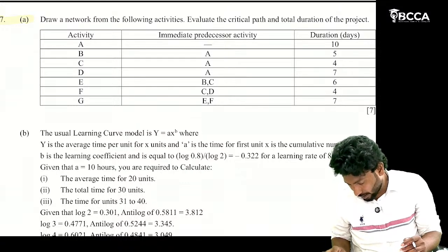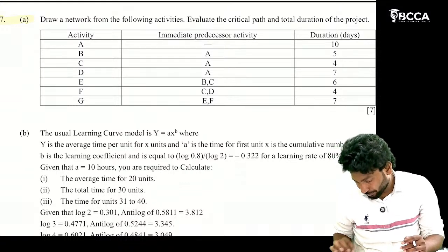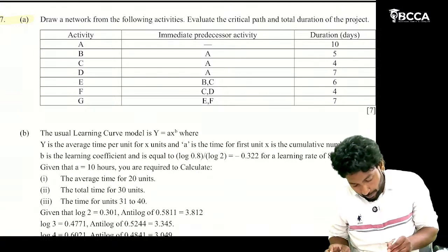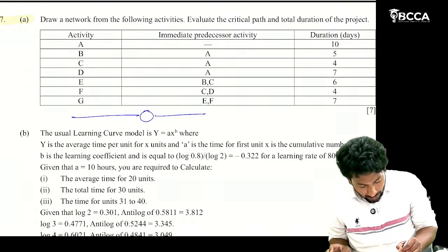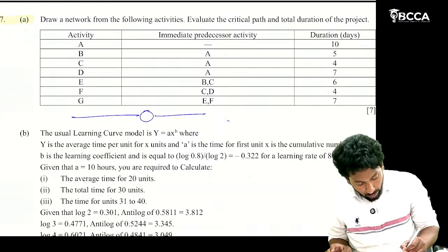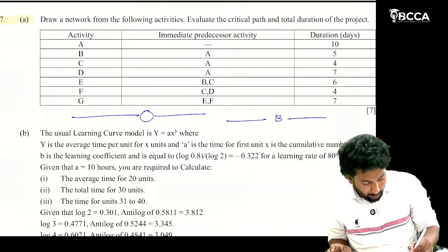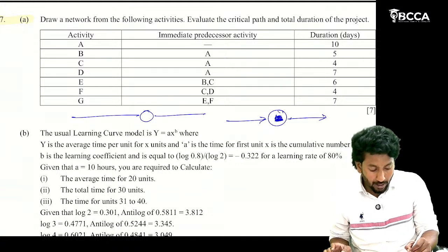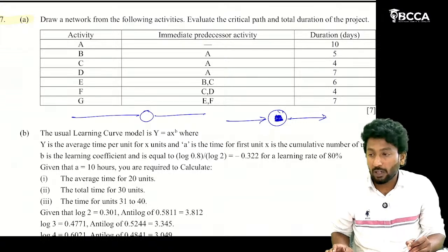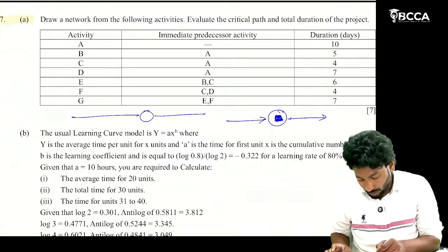If you draw a dummy line as a straight line, it will be a blunder. Nice, Lakshmi. In between the lines you have to write the event only. You should not write the activity B in between the lines like this. This becomes an event. Events will be named as 1, 2, 3, 4, numbers only.